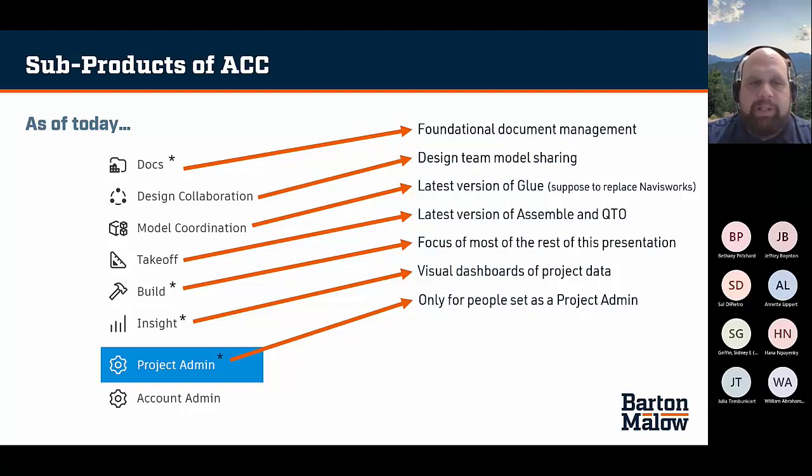One of the other big things in there is the locations, which I'll talk about a little bit. Basically it's a database of all the different rooms, spaces, areas, however you want to break it up, that we're going to be linking stuff to. So it's just a big database of rooms. Usually what I'll do is make a room schedule in a copy of the design architect's model, export it, and bring it into Build, and that's my location list, at least to start with. I'll add things like north facade, east facade, that aren't going to be on that room list, but that builds out 99% of it right there.